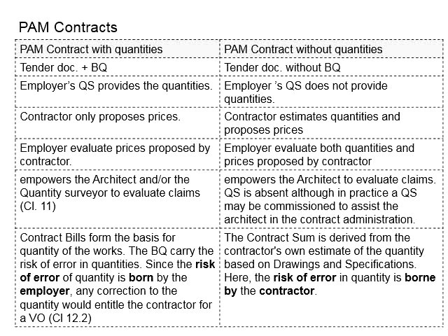Therefore, at the stage of selecting a suitable contractor, if using the PAM contract without quantities, normally the employer will also need to check whether the quantities as proposed by the contractor are reasonable.